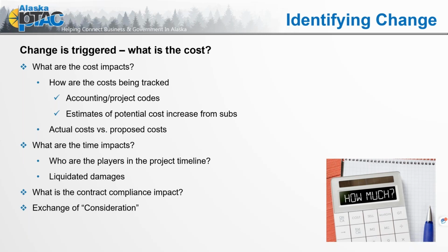I've taken several DAU, Defense Acquisition University, classes that are for contracting staff, and one of the things they always talk about is consideration. If the contractor is asking for a time delay without penalty, the contracting officer is taught to ask, well, what are you going to give me in exchange? What is the consideration for our improvement? When we talk about consideration, they're always referring to time or money. So keep that in mind as part of your negotiating process.